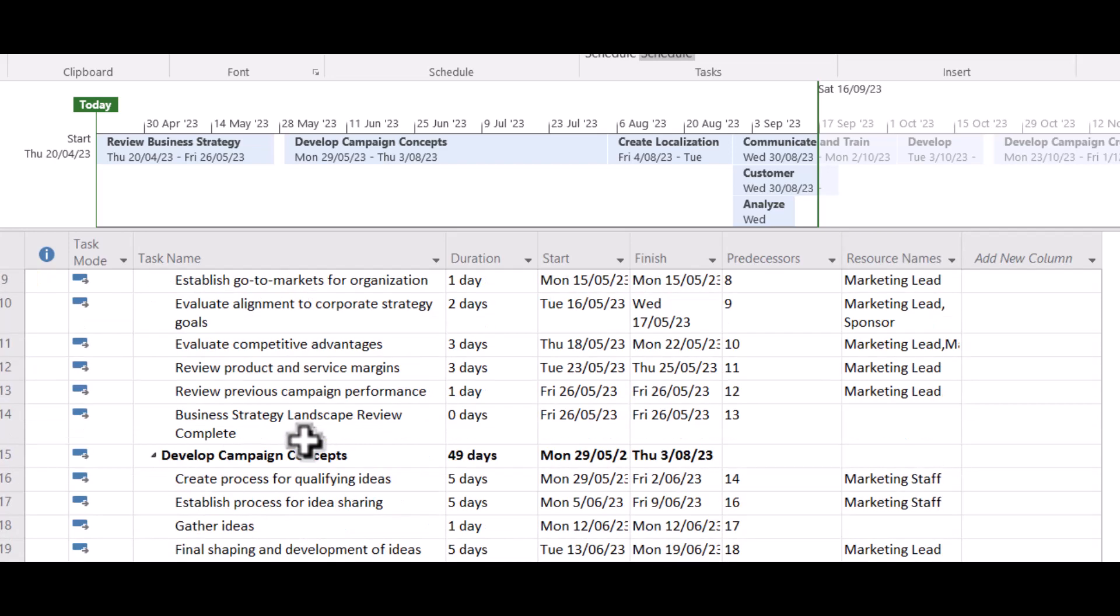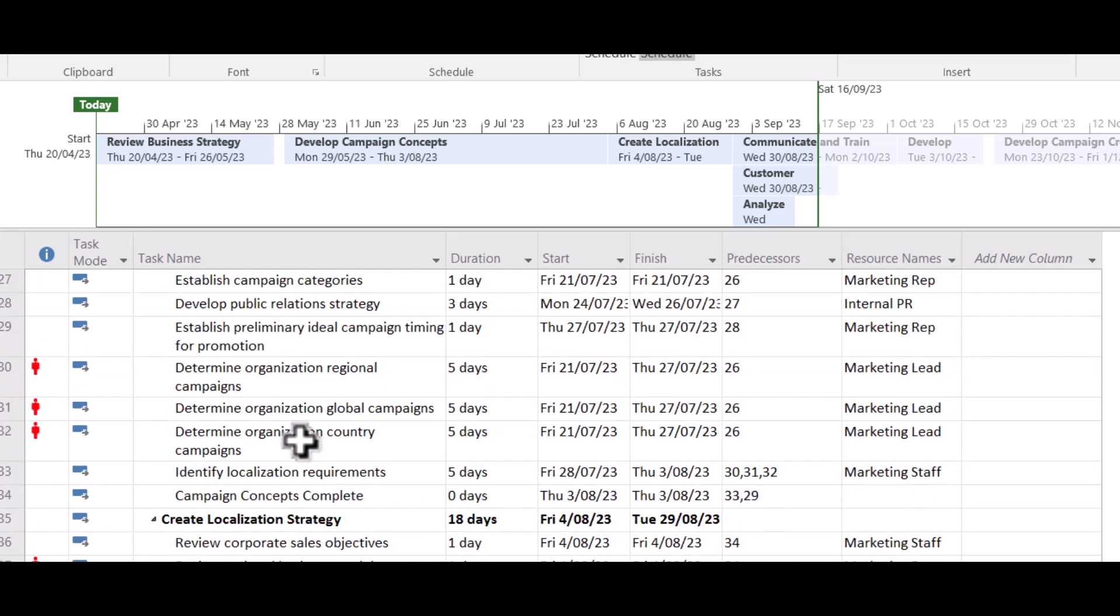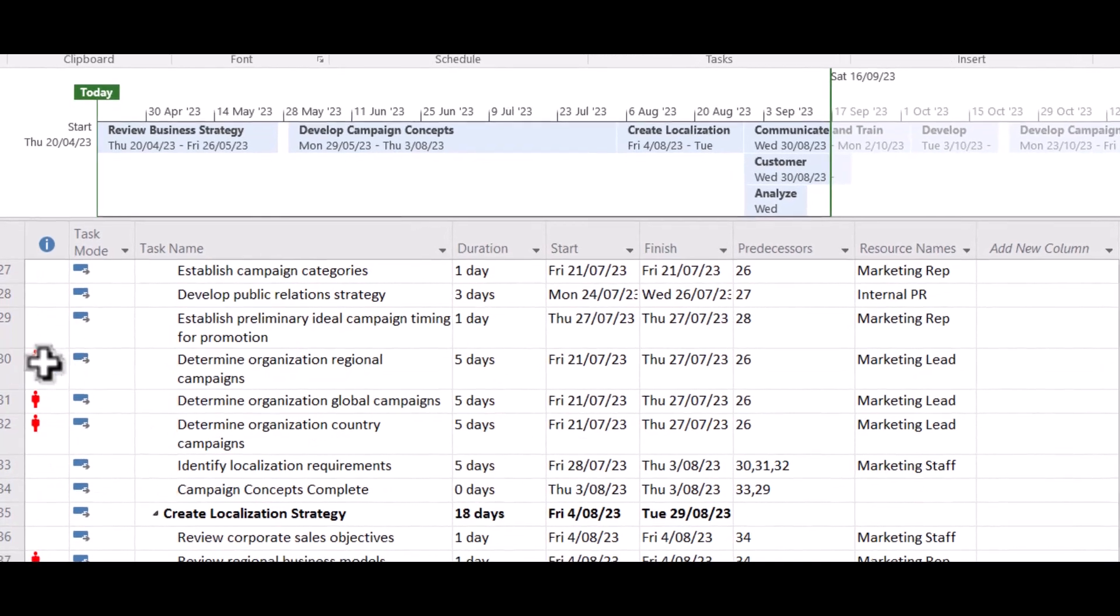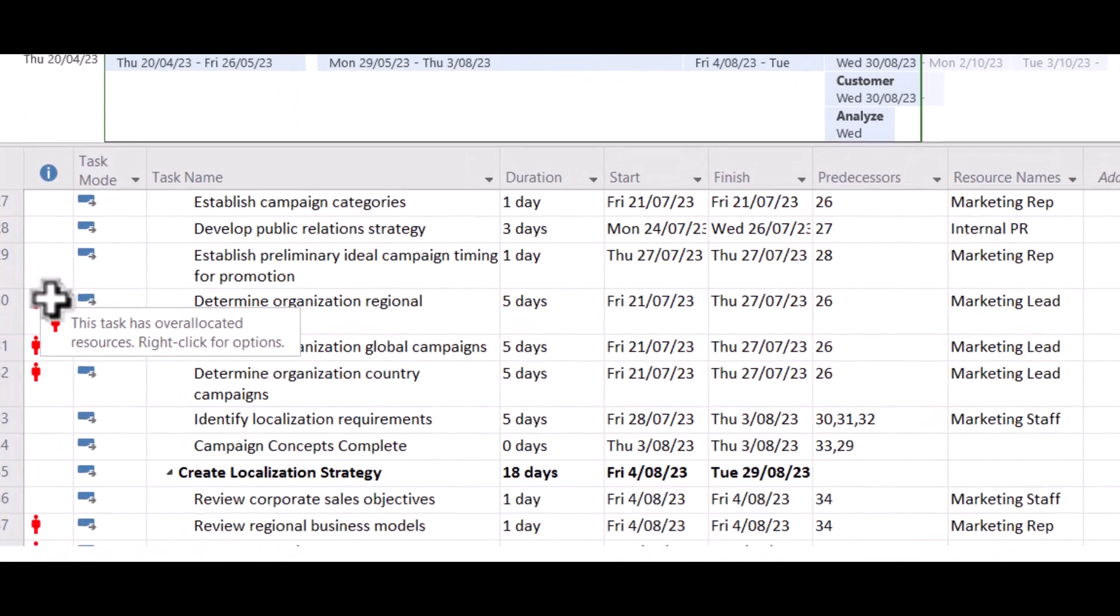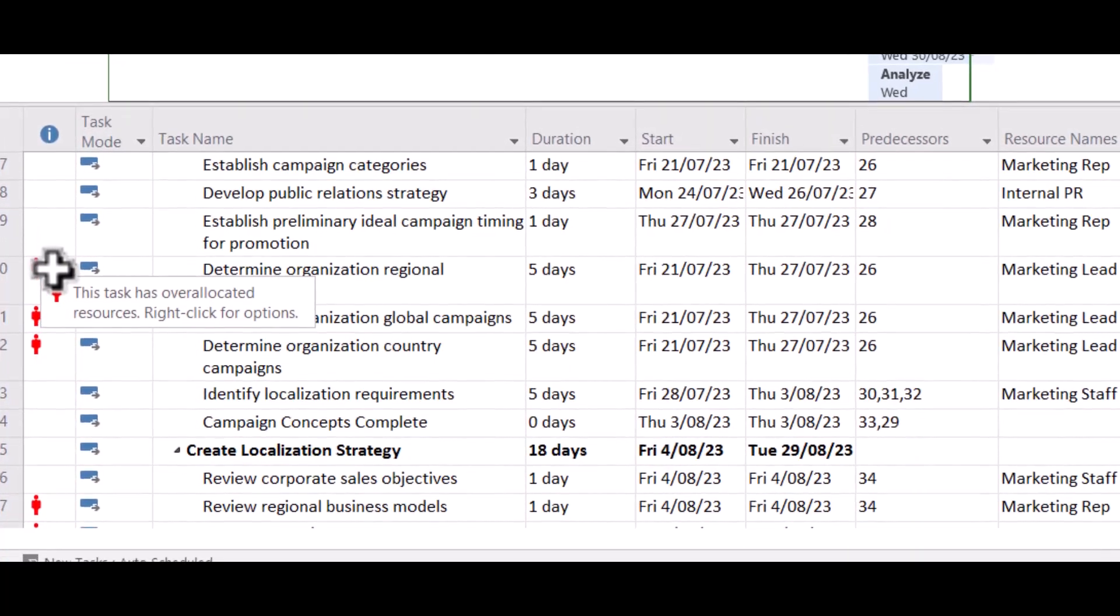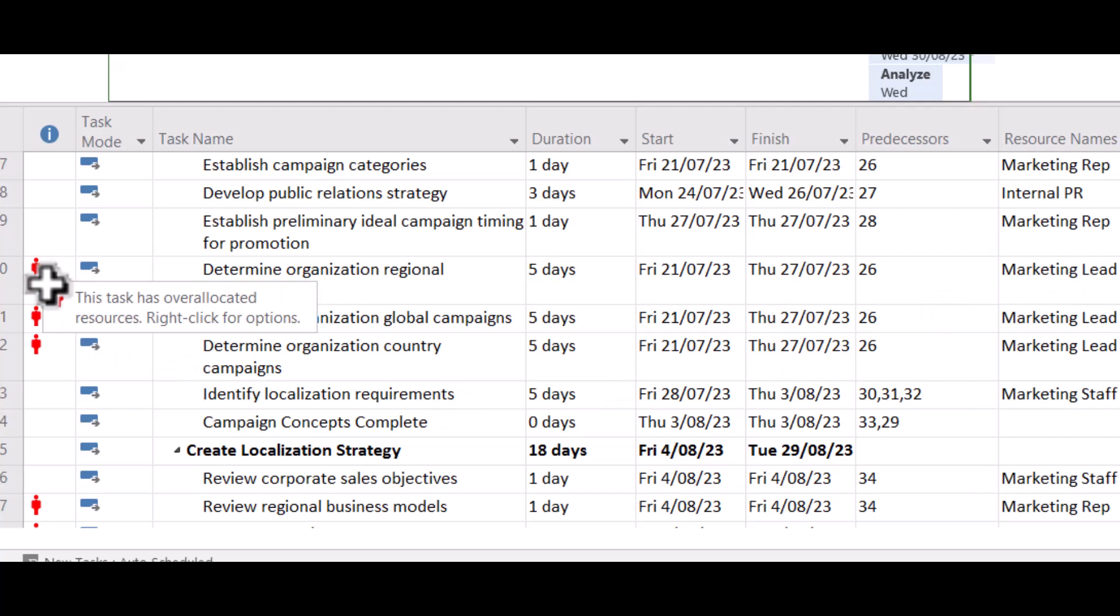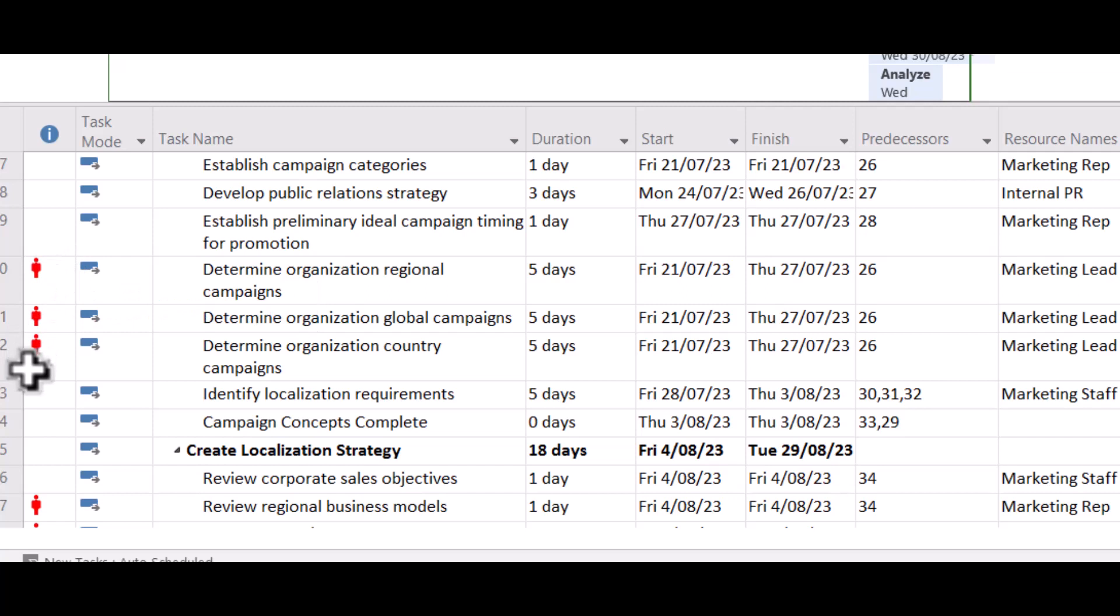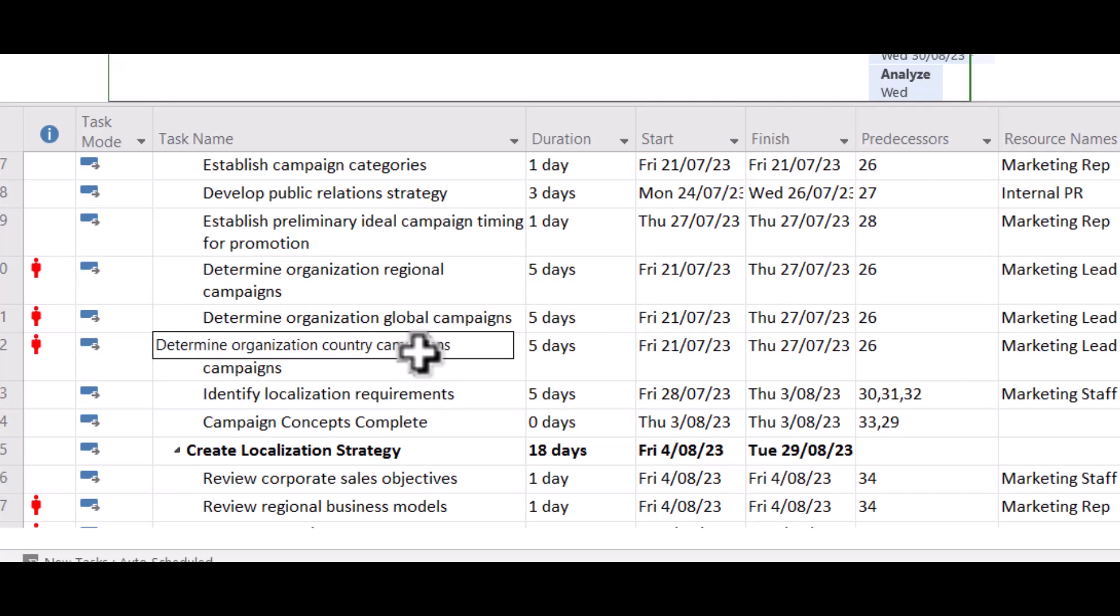The other thing I'll point out down the bottom of this one are these little red people. So what this is indicating is that a task has been over-allocated to a particular resource. So what it's saying is this marketing lead has been given too much work. For example, if they're on 40 hours a week, we've scheduled them for a lot more than 40 hours a week. Now in some instances you won't mind because you know they're toggling between a few things and they're not actually over-allocated. In other instances, you might have made a mistake.